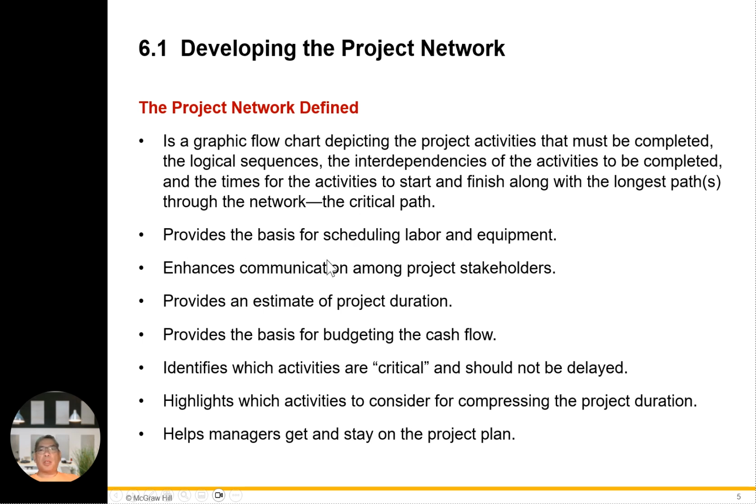It provides the basis for scheduling labor and equipment, enhances communication among project stakeholders, provides an estimate of project duration, provides the basis for budgeting cash flow, identifies which activities are critical and should not be delayed, highlights which activities to consider for compressing the project duration, and helps managers get and stay on the project plan.